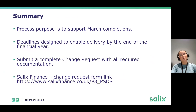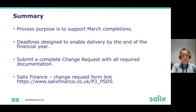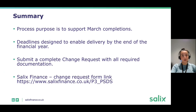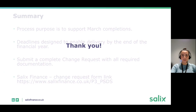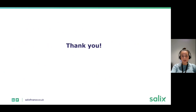To summarise: this process supports March completions, and the deadlines are designed to enable project delivery by the end of the financial year. Please ensure you submit a change request form, the updated application form, and all supporting documents — including energy saving calculations and an updated project programme and risk register — so we can assess your submission as quickly as possible. Visit the Salix website if you have further questions, or reach out to your relationship manager. Thank you for listening.